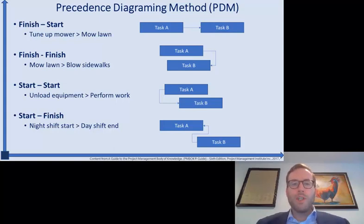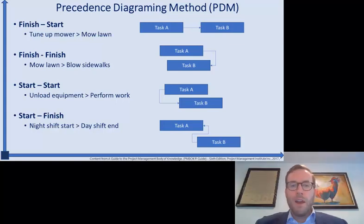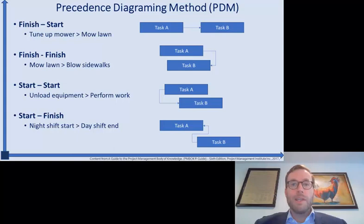We're going to talk about four relationship types. First, finish-to-start relationships, where the predecessor activity has to finish before the successor can start. Second, finish-to-finish relationships, where the predecessor has to finish before the successor can finish. Third, start-to-start, where the predecessor activity must start before the successor activity can start. And finally, a start-to-finish relationship type, where the successor activity must start before the predecessor, the first activity, can officially finish.